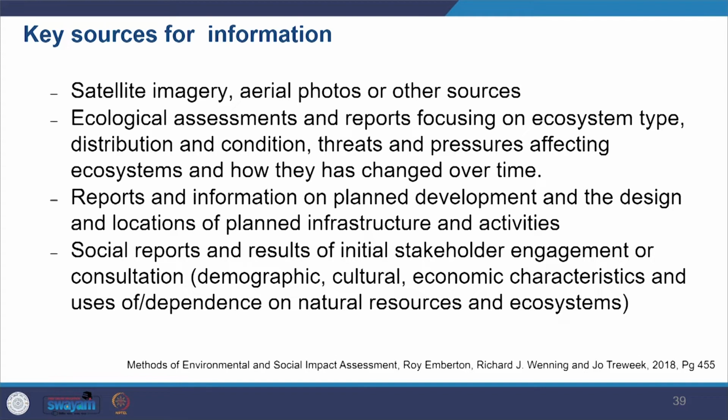Then you might look at the reports and information on the plant development and the design and location of the plant infrastructure and activities. So there will already be a proposal of the planned activities, so you need to look at that. Then you need to look at the social reports and results of initial stakeholder engagement. So you look at what engagement has been there and what consultation process has taken place. And then you need to look at the demographic profile, cultural and economic characteristics, and uses and dependency on natural resources and ecosystems. So you need to profile that.